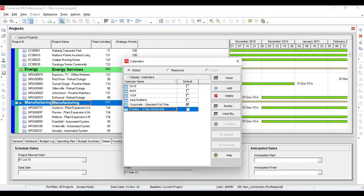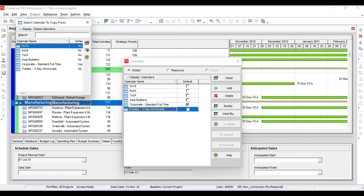By the way, there are three types of calendars: Global Calendar, Resource Calendar, and Project Calendar. If you define a Global Calendar, the change will be taken by the enterprise. If you define a Resource Calendar, resources will use it, and Project Calendar works the same way for projects. I will now define a new calendar.